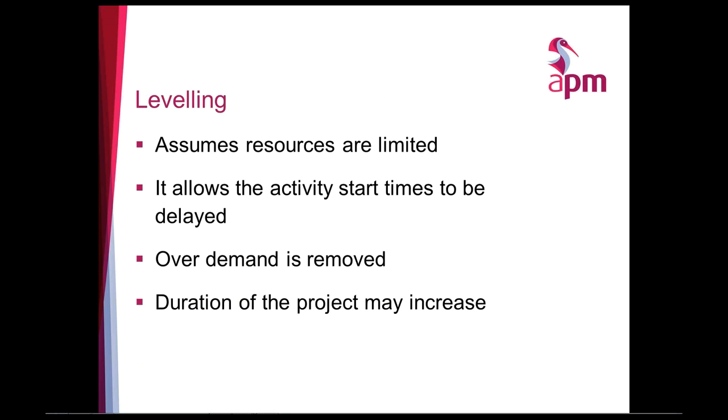What we can also do is leveling. Now, leveling, again, assumes you've got limited resources, and it delays or allows the start times to be delayed or extended, and it removes all the overutilization completely. However, it does this at the expense of the end date. All right, so often if you carry out a leveling exercise, what you'll see is your end date will just disappear off to the right. So it has to be used with caution.